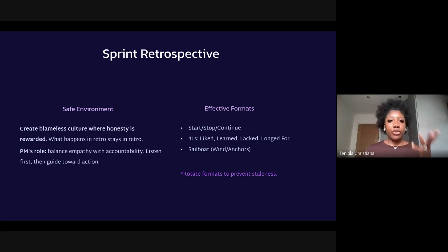People aren't always the greatest at estimating their level of capacity in any given week or 2-week time frame, and how much time it takes them to get work done. And that's fine. But the point of these retrospectives is to get closer to a better estimate, so that you as a team can realistically say, okay, generally speaking, we complete, I don't know, 4 user stories in a 2-week sprint. So that's what we're going to use, right?